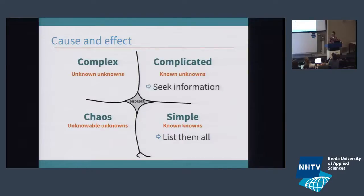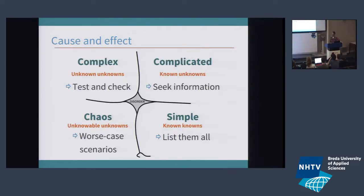For simple risk, you basically list them all. If you have more complicated risk, you seek information — you describe the risk and then seek some extra information about it. For complex risk, you can test and check. And for chaotic risks, you're going to assume the worst-case scenario — that's often then a good starting spot.